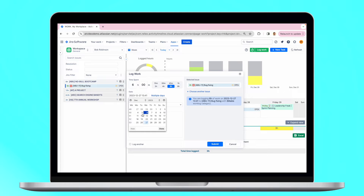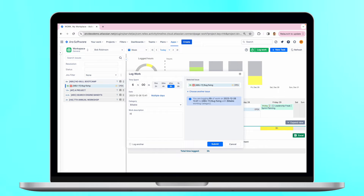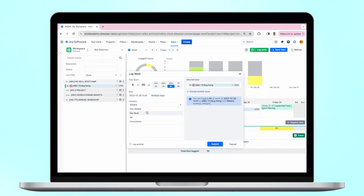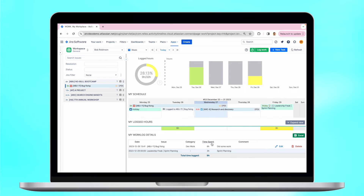Choose the date or log for multiple days immediately. You can add a work description, but what is more important, you can mark logged time as billable or non-billable, or choose other custom work log categories to describe your worked time. These categories will be visible in the timesheet reports.